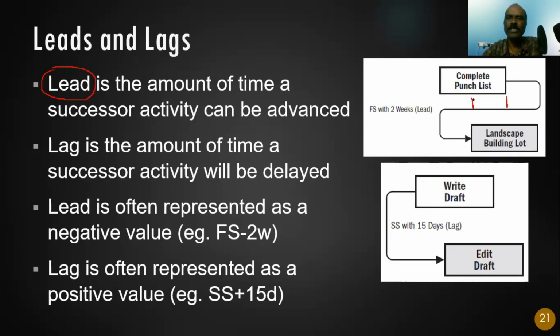Maybe like 2 weeks earlier, you want to start your landscaping work, because you know that most of the building work is completed, is mostly acceptable to the customer. Very little work is left over. So you can start the landscaping. We don't wait for everything to complete. So this is called a lead, where you are taking a lead. You are not waiting until the completion. You are going in front, right? You are going 2 weeks in front.